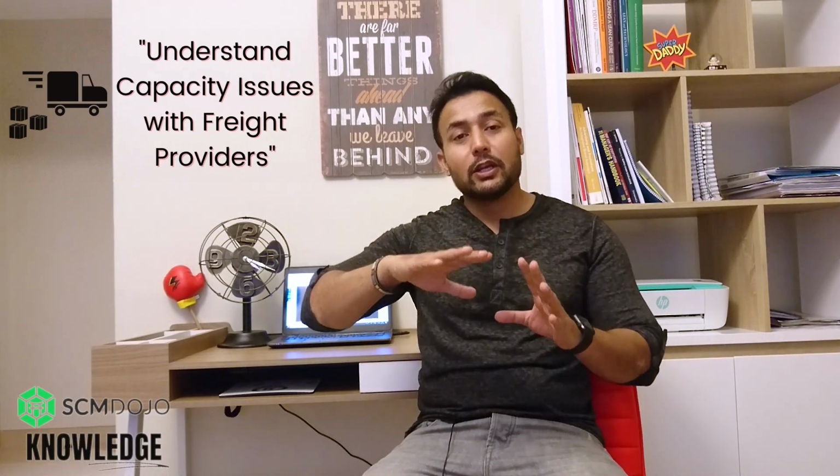So where is the implication? The actual implication, depending on the lead time, which is generally 4 to 8 weeks from China for most customers in Europe, Middle East, Africa, and worldwide, is going to be just before summer, right? Which will be April, May, June time, where generally there's a peak in sales for whatever commodity you're trading in, right? So therefore, you have to start thinking almost 6 months before. Where will be the implications of not having the product available, right?